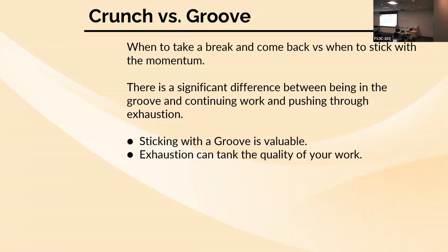And don't put yourself in a spot where you have to crunch if you didn't really have to crunch. When we do our sprint planning in this class, we're going to be planning 20 to 28 hours' worth of work every week, which isn't a minor amount of work. I'm not saying that's not going to be a crazy amount, but that should be maintainable too. That still should be something you can get done within a week's worth of time, right? I don't want it to be something that you have to burn yourself out to do.